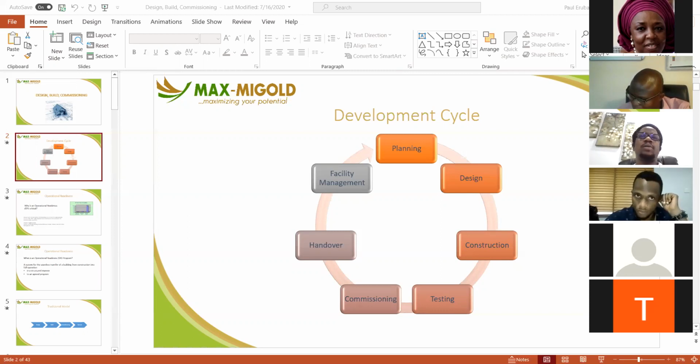Okay. And we have done power commissioning by using a load bank, for example. You bring a bank of resistors and plug it to the gen to simulate load impact on the generator, so you can know whether the gen can take the load rating, right? So that's simulated commissioning. I cannot commission the gen by using a load bank, right?